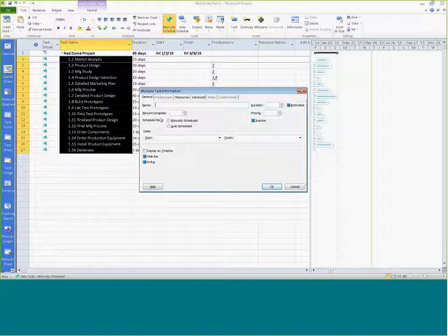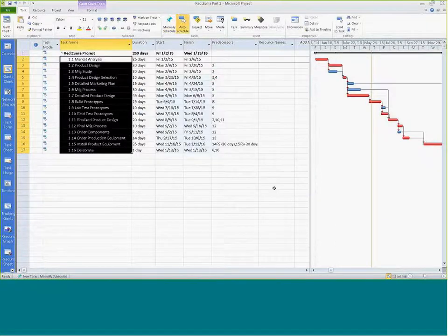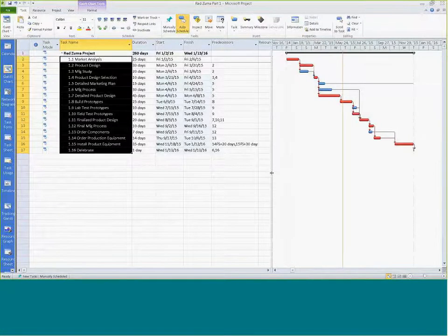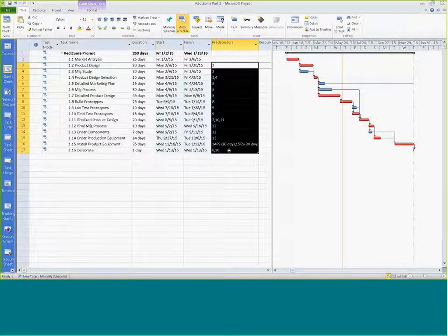And so I think that is keeping us from, we want to schedule those, and we also want our task type to be effort, start as soon as possible. Looking for type. We want as soon as possible, and it should correct that. So once we put in the predecessors, and we know the project start date, which is January 1st, 2015, these will build out.